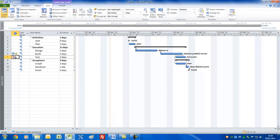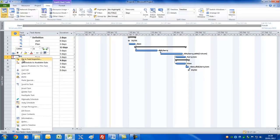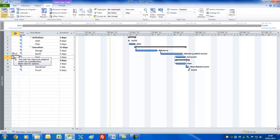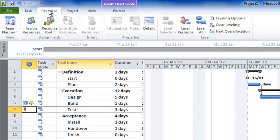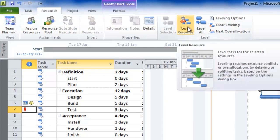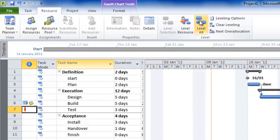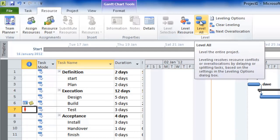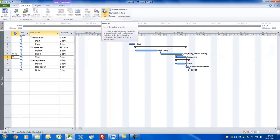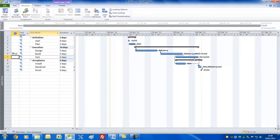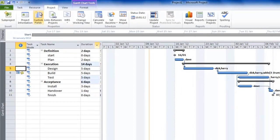We need to check for resource problems. There's a red figure on the Test task indicating a resource over-allocation. You can right-click and use the Task Inspector, or have Project reschedule the task automatically. I'll use the traditional method: go to the Resource tab and click Level All to fix everything in one go. Project will delay or split tasks as needed — and sure enough, it's increased the duration of some tasks to fix the over-allocation. We now have no resource problems.